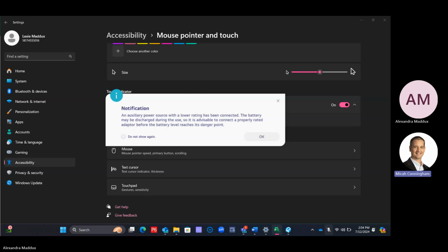That's the only risk you run if you overlap your logic with start to start: you have those open finishes to be mindful of. Whatever logic you tie in, you want to make sure it pushes out the next sequence that it should, so that if you have a delay, you don't have to modify anything to show that delay.